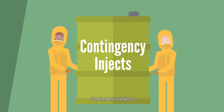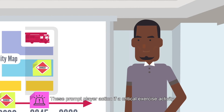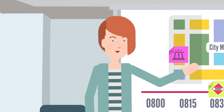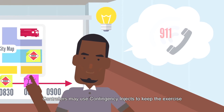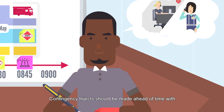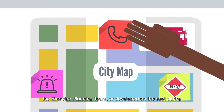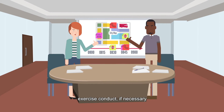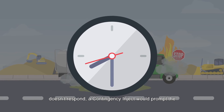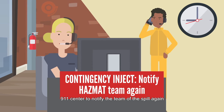Contingency injects prompt player action if a critical exercise activity does not occur. Controllers may use contingency injects to keep the exercise on track and help player actions meet the objectives. Contingency injects should be made ahead of time with the exercise planning team, or developed on the spot during exercise conduct if necessary. For example, in the hazmat spill scenario, if the hazmat team doesn't respond, a contingency inject would prompt the 911 center to notify the team.